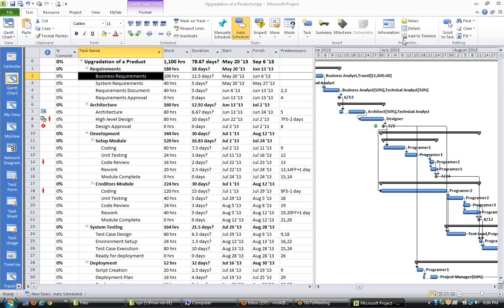It is to measure performance, as to where we stand against the scheduled tasks. That is the reason the baseline helps the project manager identify where the delay is in a specific task. If we do a baseline, what are all the metrics? And if we don't do a baseline, what? It is the plan plus or minus approved changes against the original plan.